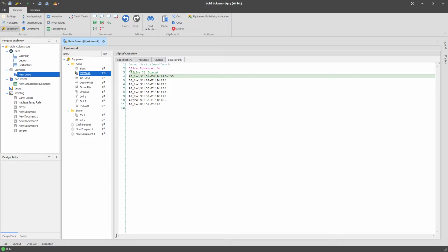So basically, if you've got comments around your code like this, what you can do is add the syntax for a label, which is label with a colon after it, and an optional space. The only other trick to this, if you don't want your label to continue to apply underneath, is that, just like allow advance or in range or something else, you need to turn your label back off underneath. So we've got a label here which is called alpha S1 box cut.